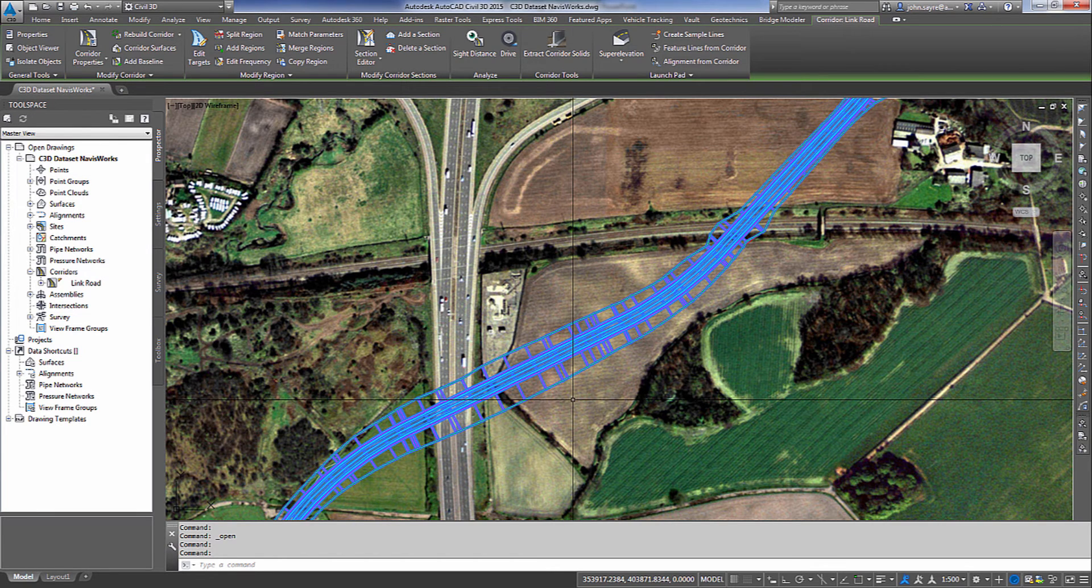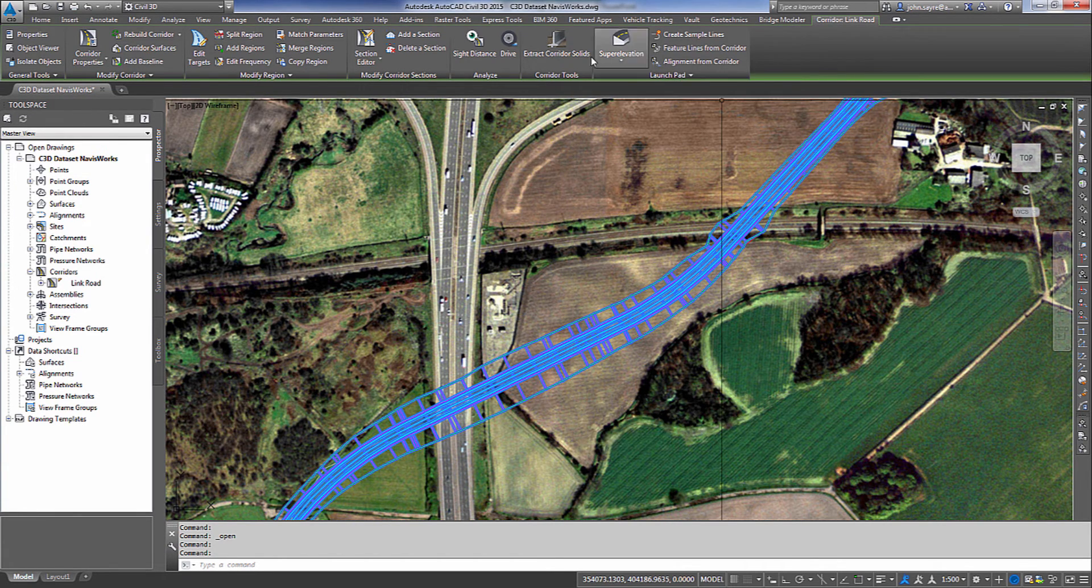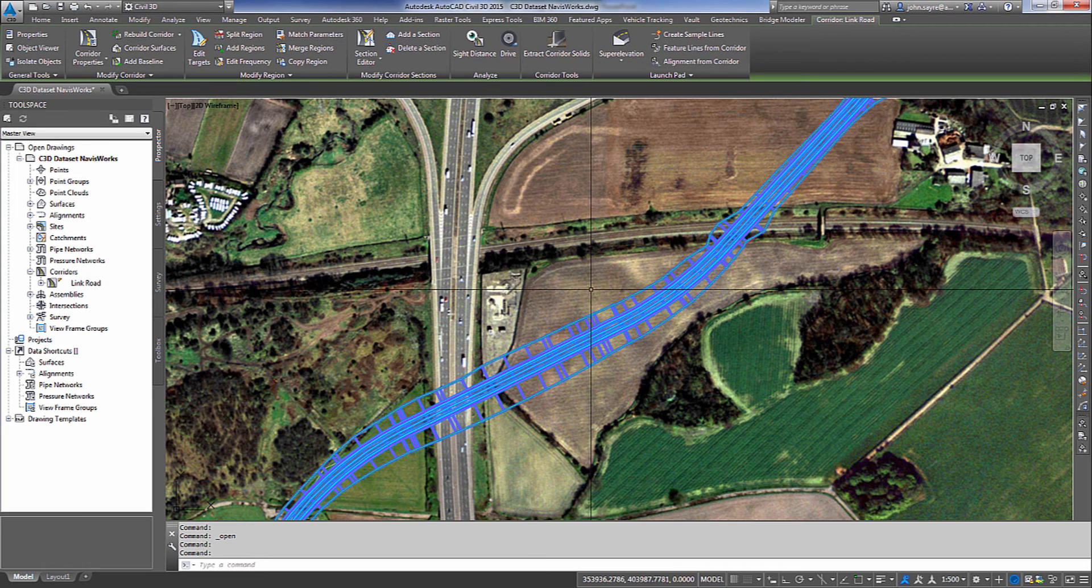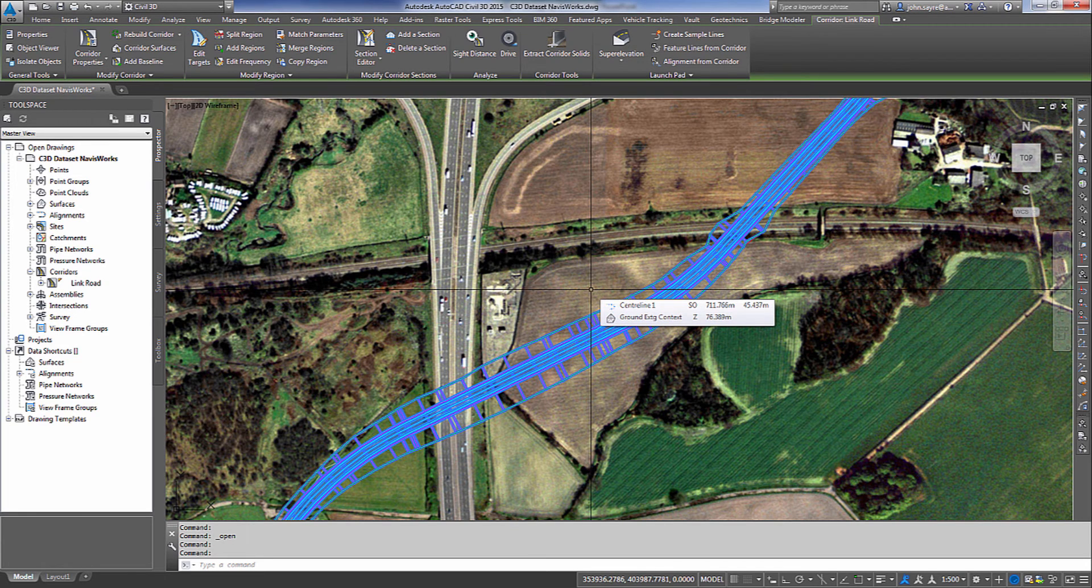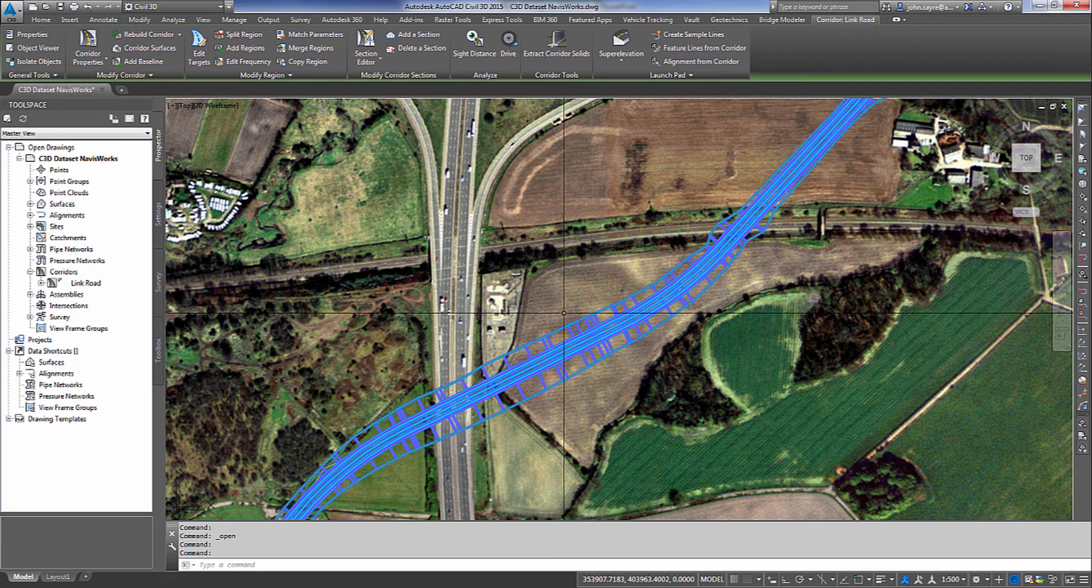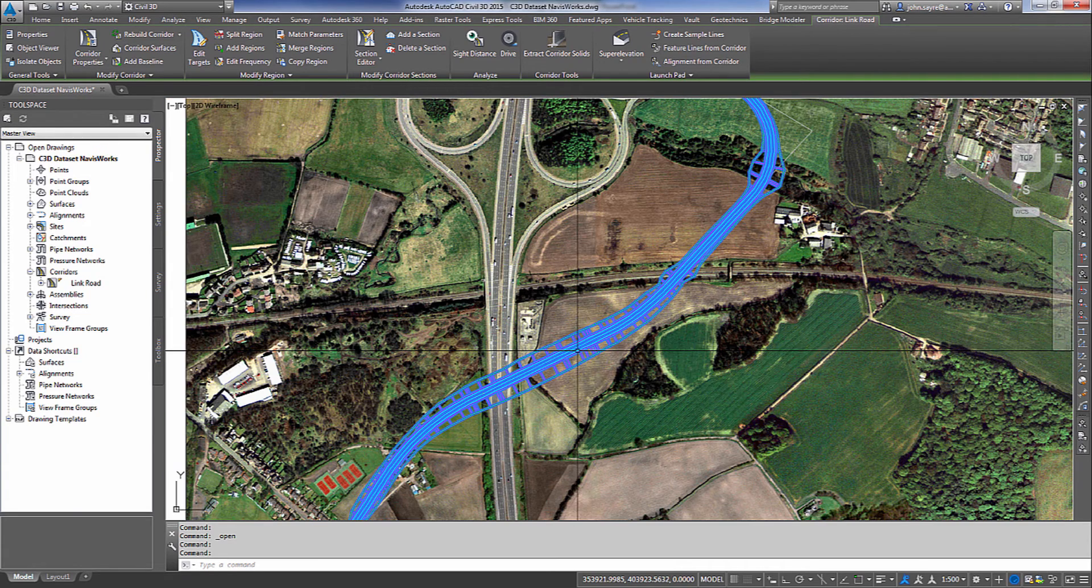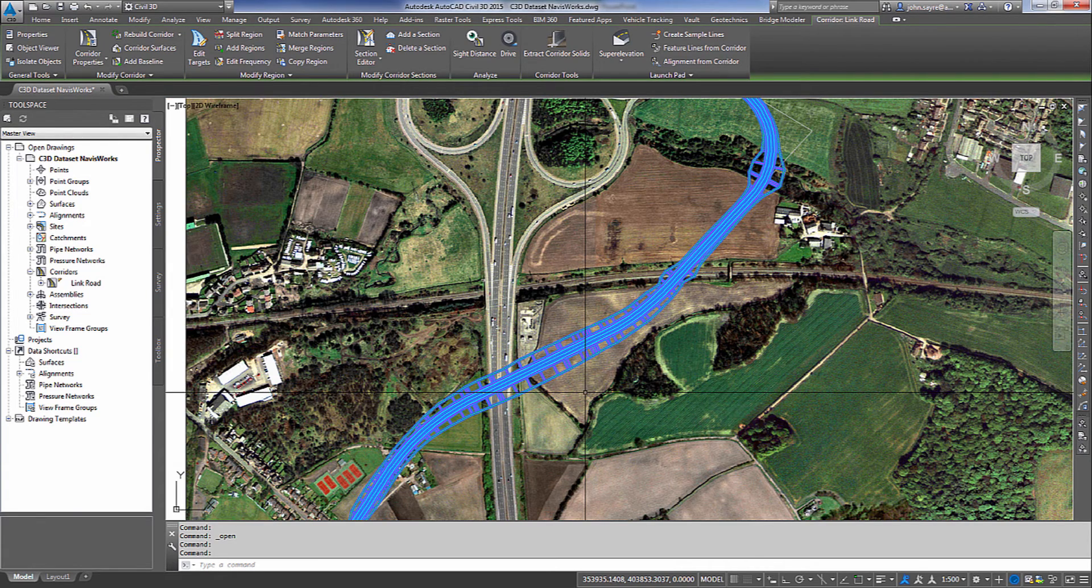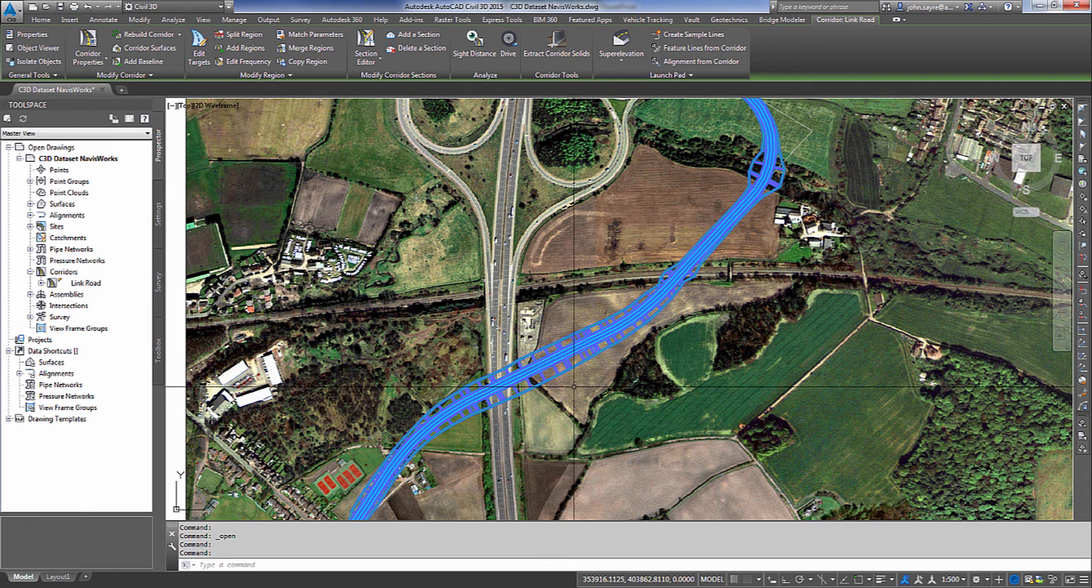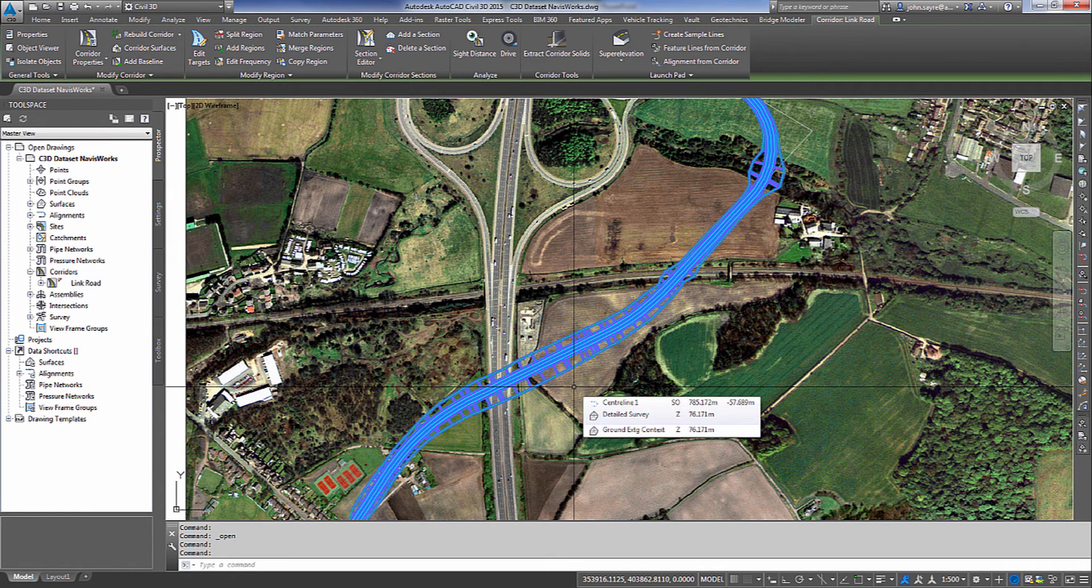I say that we're going to break this down into 300 meter increments. Whenever we extract our corridor solids, we will set the regions that we want distance-wise. Meaning we will tell it that we want to go 300 meter increments. Our corridor itself doesn't have to be broken down that way. Now we all know that whenever you're generating a corridor, it's not ideal to try and match a specific schedule because we don't really know what that is when we're doing the design.